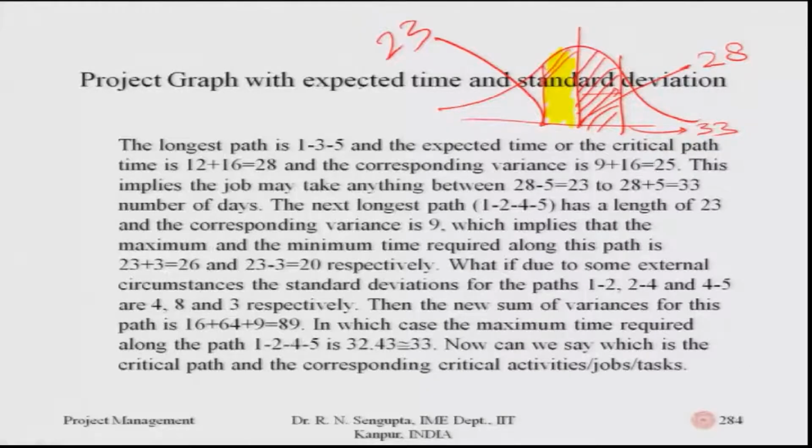Now, if you look at this distribution, if you follow the simple concept of standard deviation, it would mean that within the number of days between 23 to 33, you are assured that you will be able to cover, in a very theoretical sense, I am just first mentioning the theoretical concept, that the overall area of coverage is about 1 standard deviation onto the right and the left. So, the overall coverage, let me go into just the values, it may not be exact, is about 67.